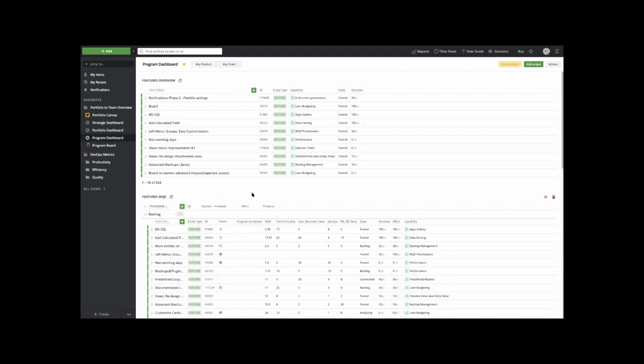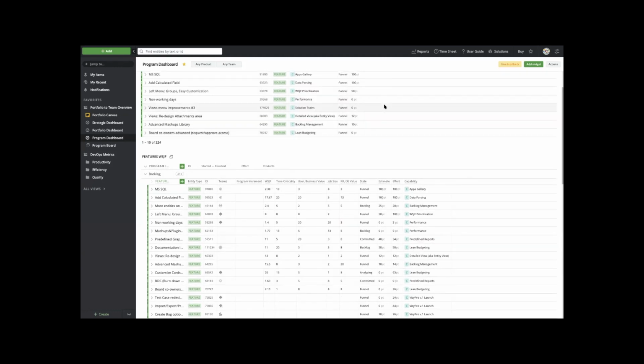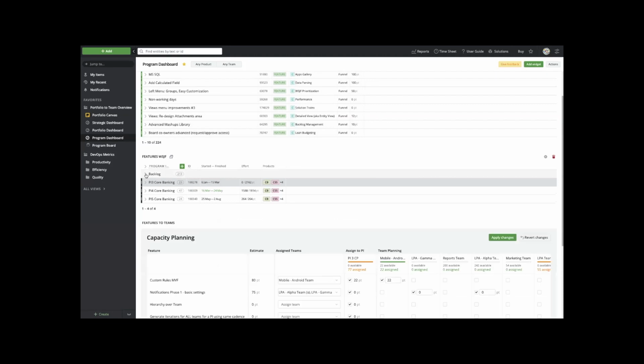So when I say moving into the backlog, we're going to put a weighted score on this. We're going to add time criticality or business value or a risk reduction score on here, so we can then actually say how big is this feature, what's the weighted shortest job first for that feature. We can organize the work by that. We can easily put in additional values in here and make sure that as we're doing our planning, that we're tracking exactly the size and the work that we want to do. And this is all helping us to get into breaking that work down for the teams. So this is one way to take the work at a high level, breaking it down into the lower levels.